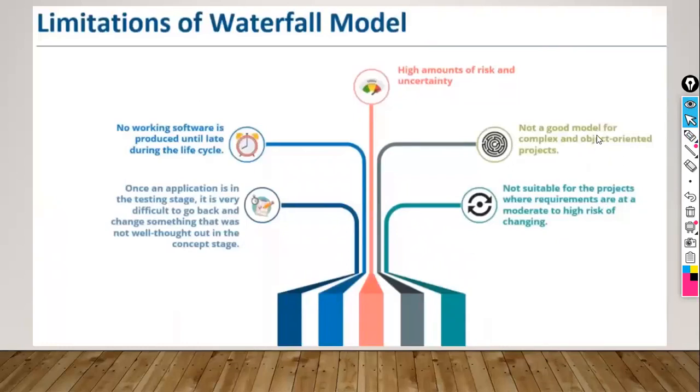And this is not a good model for complex projects, right? And this is not suitable for projects where the requirements keep on changing, right? And no working software is provided until the last stage. That is one more major drawback. And once the application is in the testing phase, it is very difficult to go back and make changes in the development part, right? So these are all the other limitations.